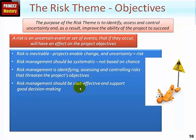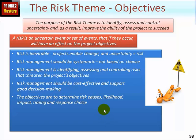Risk management should be cost-effective and support good decision making. Managing risks and carrying out responses will consume effort, cost, and time. It's important to achieve a balance between the cost of the risk occurring and the cost of the actions to manage it. The objectives are to determine the cause of each risk, the likelihood of occurring, the impact, the timing, and then making a choice about the most appropriate response.